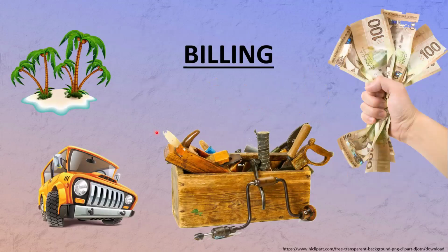And of course, this is my favorite part, the billing. Make sure, I already talked to you about billing in stages. I'm going to say it again. Bill in stages. You can have the equipment delivery stage. Get the money from the client. I talked to you about that. So that's how you can do $200,000 of equipment without having $200,000 in your account.